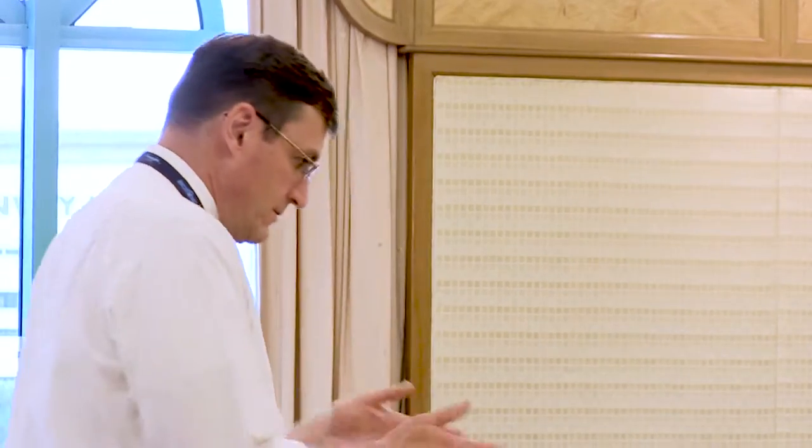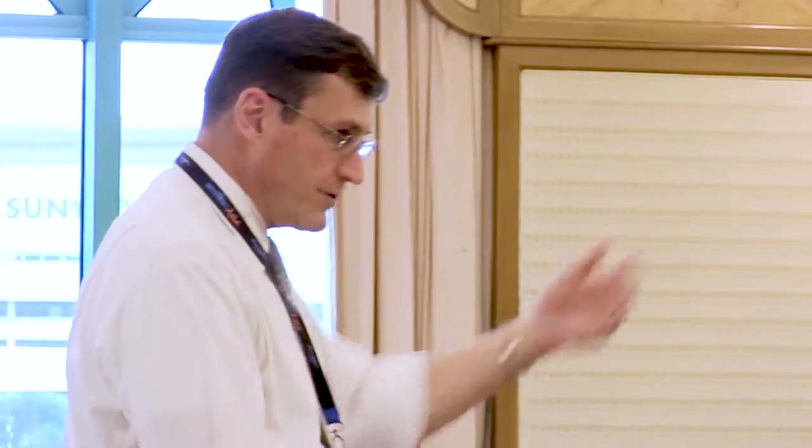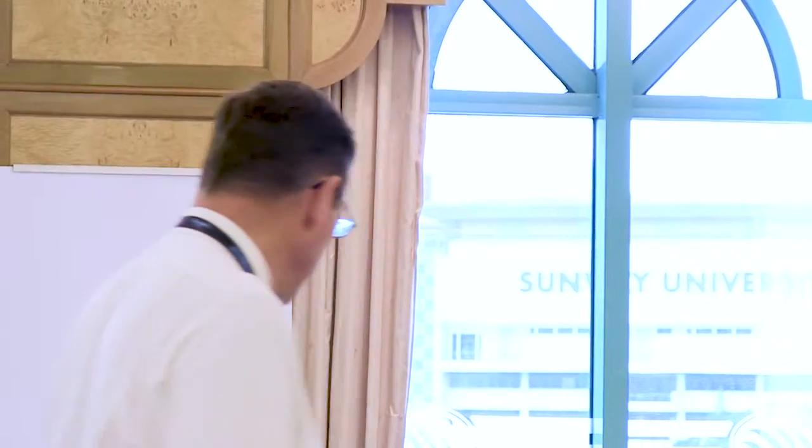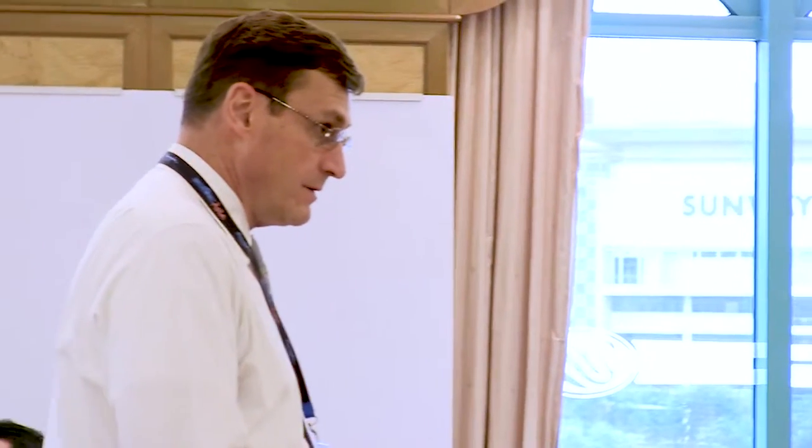Now, see, I'm not sure I would say that that's a project risk, it's really more of a quality risk, because you can test for that. You could run a test, like set up a kiosk as a low-speed kiosk, and then run a test of what happens if I try to download videos. Does it buffer, does it work properly? Yeah, remember the distinction between a project risk and a quality risk is what you run a test for. If you run a test for it, then it's probably a quality risk.